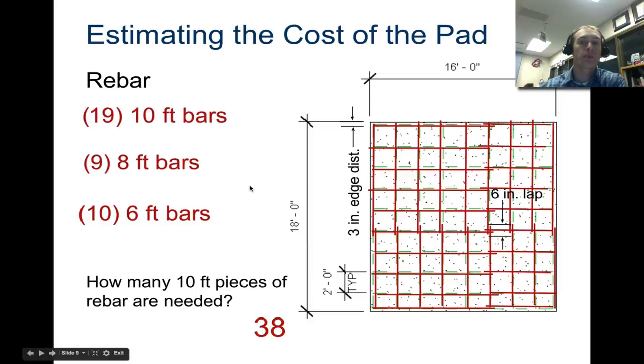If you're going to calculate the total number of rebar that you need, you're going to need 10 foot sticks. We need 1, 2, 3, 4, 5, 6, 7, 8, 9 over on this side. And then for full length sticks, we need 1, 2, 3, 4, 5, 6, 7, 8, 9, 10 going vertically. So we have 9 going this direction and 10 going vertically. That's 19 ten foot sticks.